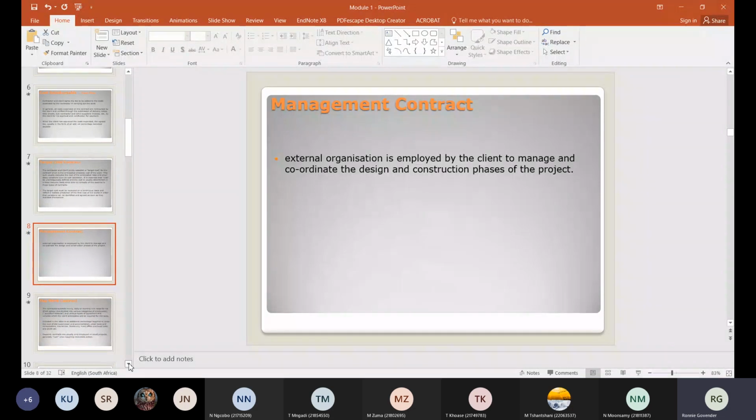So that's why the management contract comes into play, where you'll have a project manager who will tell you, okay, today you removed 50 meters of pipe, or we damaged 2 cables that were underground, and that kind of thing, and the cost is based on what is underground, because above ground you can see and you can price. Underground generally is very difficult.